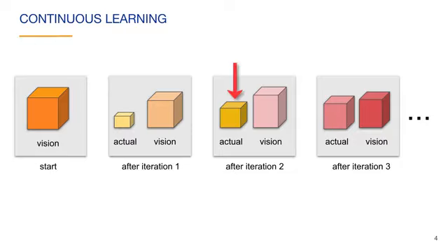After our second iteration, the product contains the work of the first iteration as well as the work of the second iteration. It now has more features that the customer will value. Because of continuous feedback, we may have improved some of the features from the first iteration. Notice that our vision has again been adapted. After the third iteration, our product is closer to our vision, but our vision has again changed slightly. You can see that we are building the project incrementally because we are building it piece by piece, and we are building it iteratively because the product gets improved as we are learning along the way. That is why Scrum is both an incremental and iterative approach to building projects.